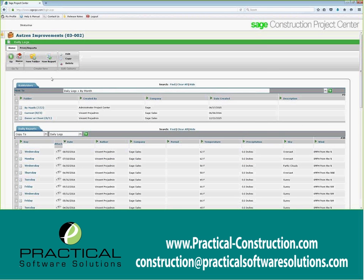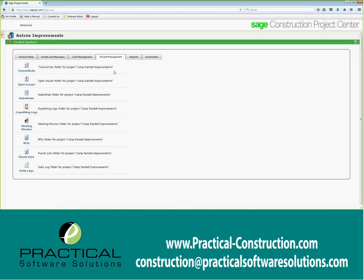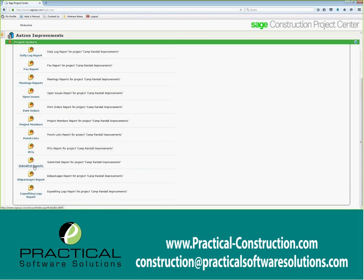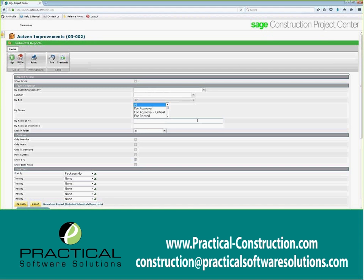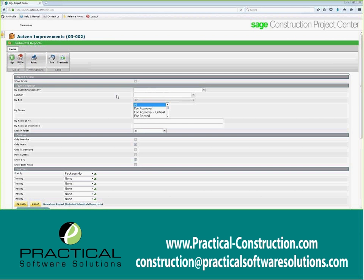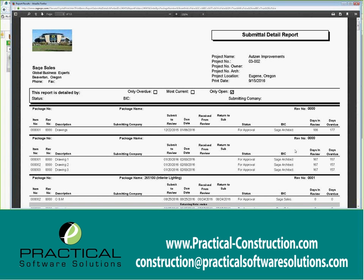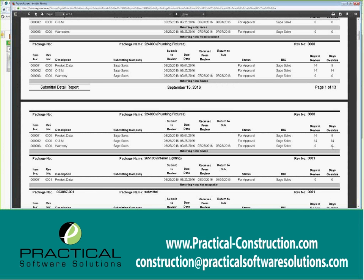Going back over to the project center itself, I'm going to cover the last few bits. Everything we've talked about — we can get reports for. We can pull out a submittal report and look at submittal details either by package or by item. All of our reports are crystal reports, which means you can download and modify them as needed. I can filter to show all open or overdue items, and the report gives me a nice summary showing each open item, who we're waiting on — the architect or myself — and how many days it's been in review or overdue.